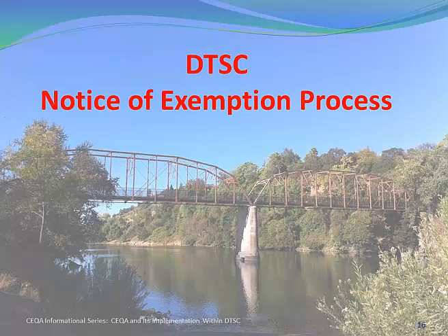If you're just going out with a cooler with a sampling kit and some test tubes, and you're just going to be scooping up some water and putting it in that container and leaving the site, obviously, you don't have potential for a physical impact there. But where you have invasive activities like drilling, crunching up soil in some fashion, maybe you only plan to take out a foot in one little spot, and one little foot in one spot becomes 5 feet below the surface in a hole that's 6 feet wide.